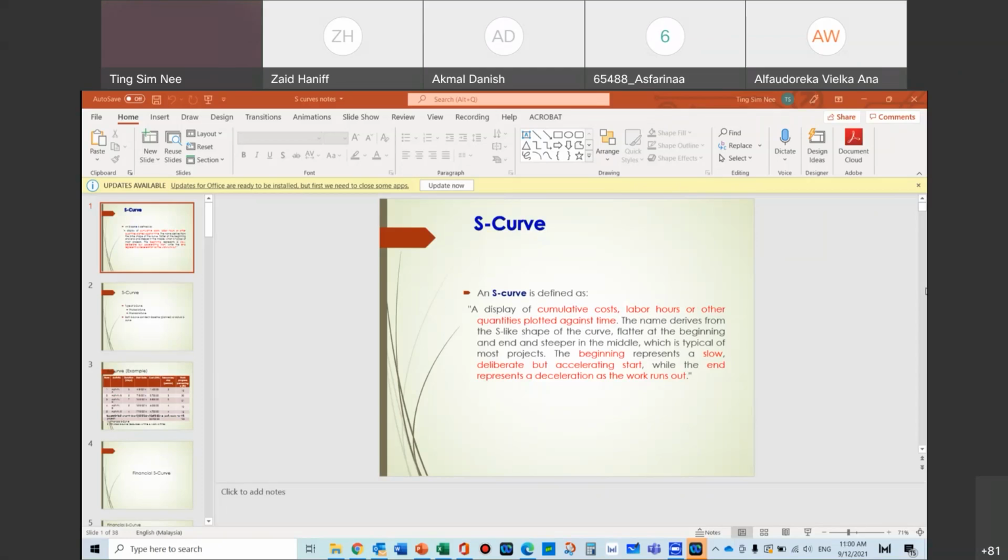If there's no discount or whatever, then you will fix that, and that will be the final budget for the job. That means this is the amount that will finally be paid to the contractor to get the project done at the end of the day. It's just like you get a quote and then you get a job. The actual job will be done by somebody, and that somebody quoted you and you follow that. So that is what we call a bottom-up budget.